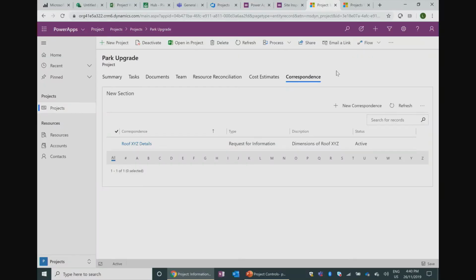It integrates back to their SAP. They use an SAP, where their finance people will say, yep, the project manager has authorized this progress payment. And the purchase order, or whatever the corresponding WBS item is, is linked, all integrated via this one common platform that marries all these entities together.